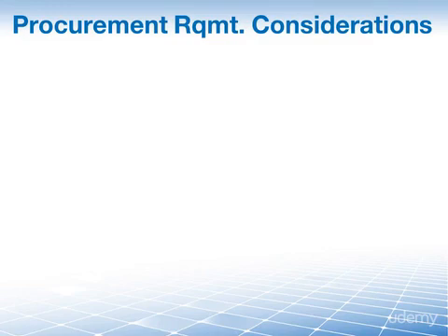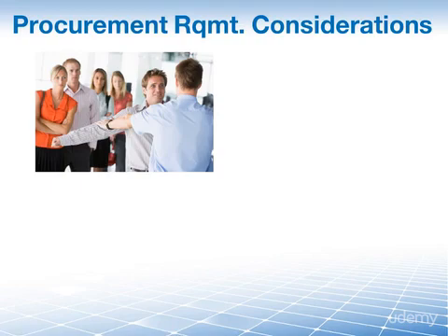Let me give you 4 examples of things to consider from your requirements documentation. First of all, security. They just won't let anyone into an airport or plane anymore these days. And well, for some projects, you can't just let anyone work on it. Knowledge, skill, and ability in your team is important, but may not be sufficient. For example, if you're working on sensitive government projects, any contractor that you take on board will likely have to pass a very rigorous background check before you even tell them what the project is all about.